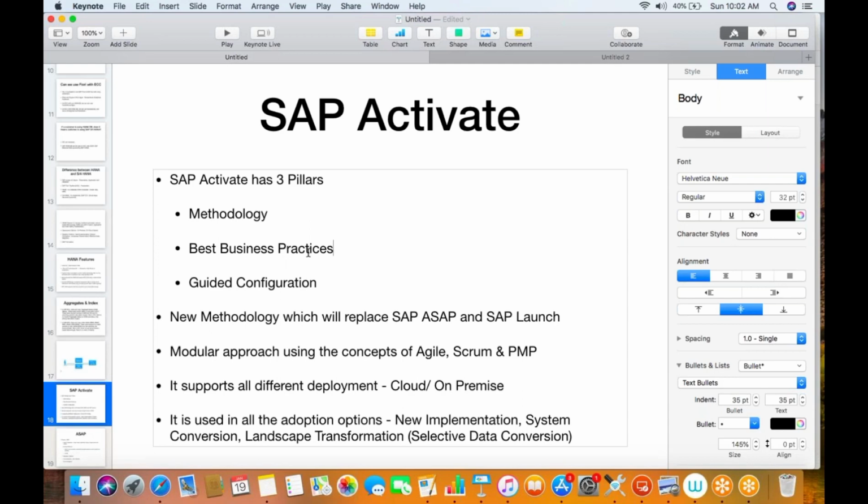That is where our expertise will come into place, right? So for example, if you think that one process is dependent on another, so till the time the second process is not getting developed, you cannot implement the first process. So that particular process can be skipped in the first modular approach. So whatever is fit, you can implement that. Whatever is not fit, if you think that whatever is fit is not enough, we cannot go ahead only with these changes, then maybe whatever are the mandatory things to develop, wait for that and then go for the first phase.